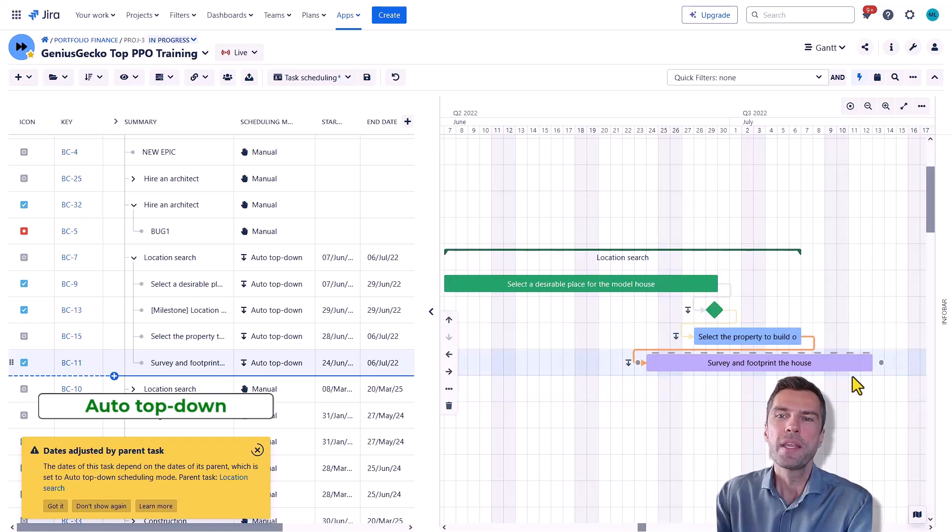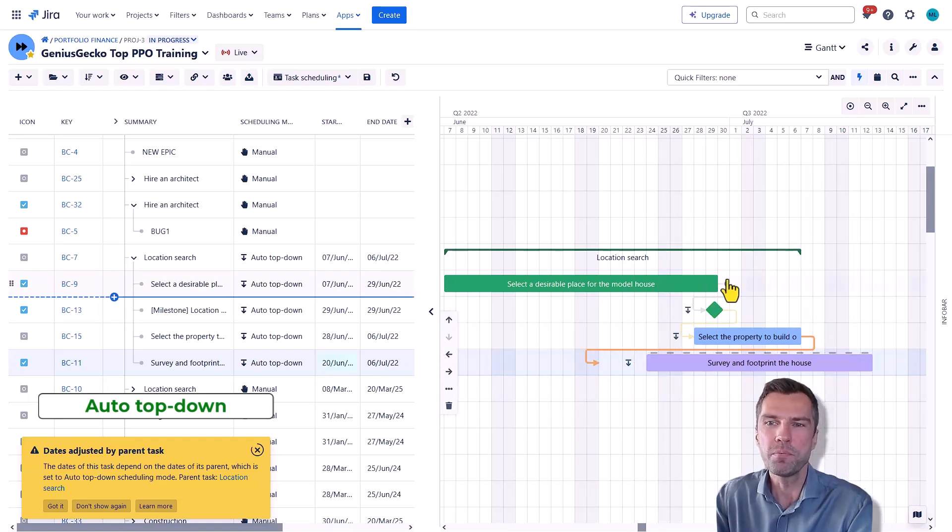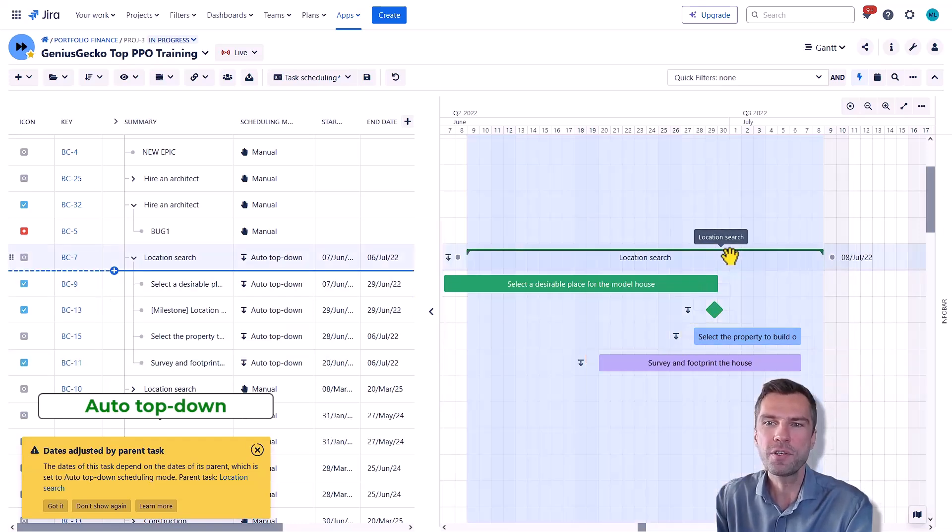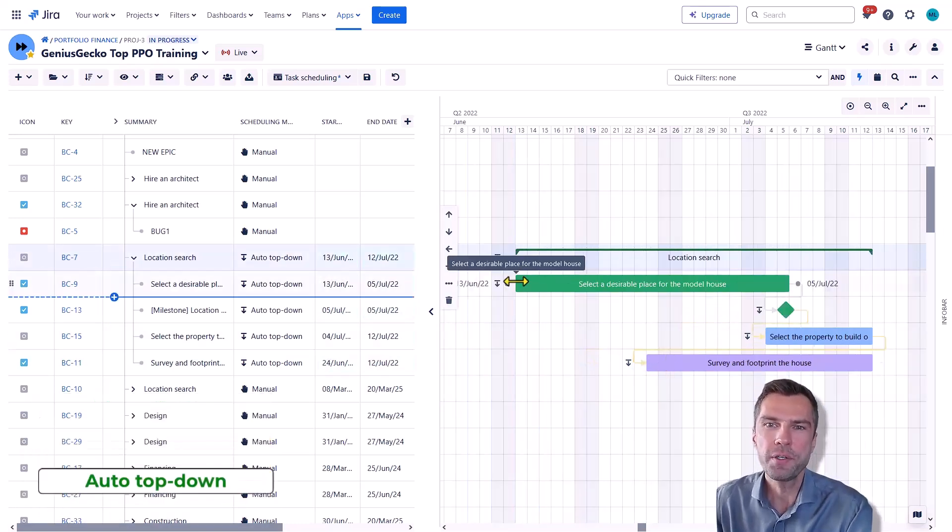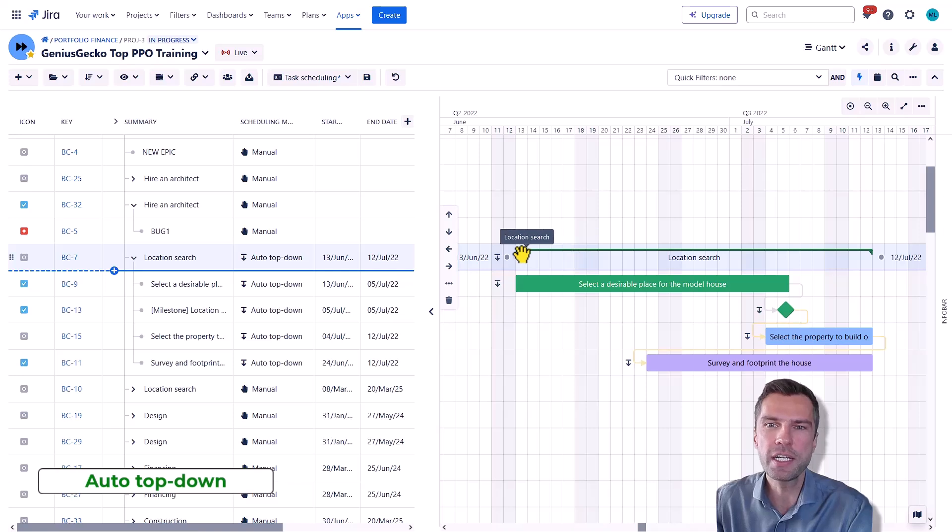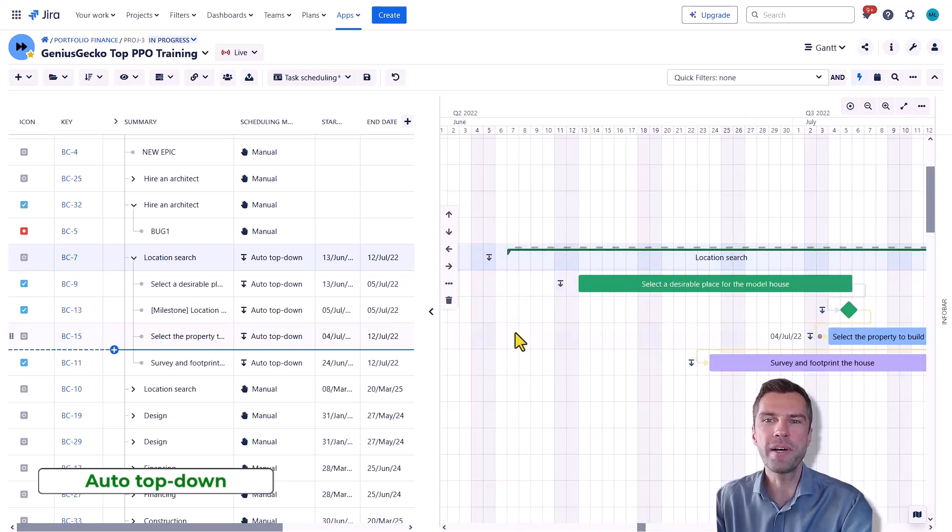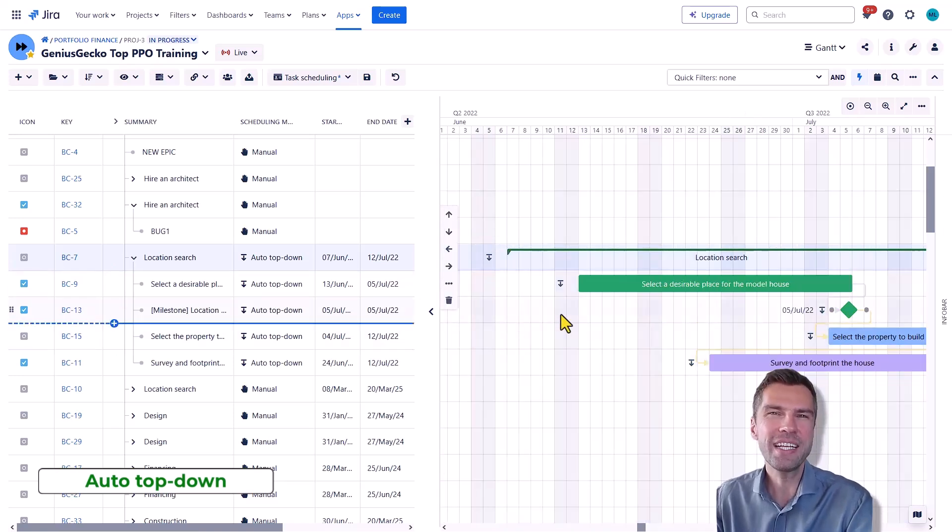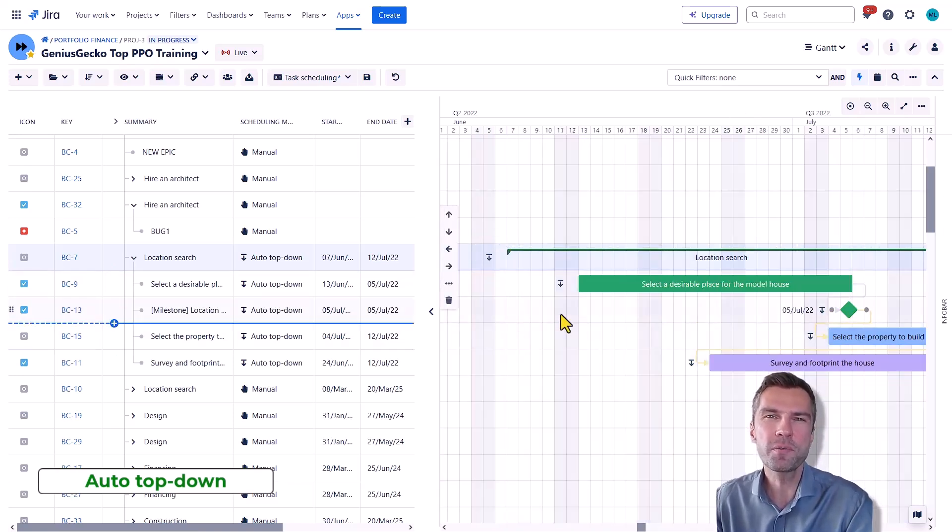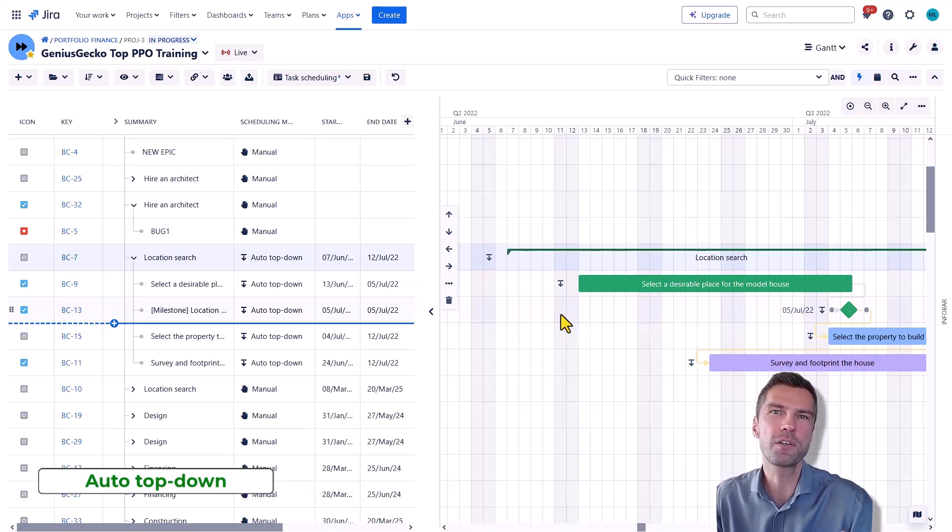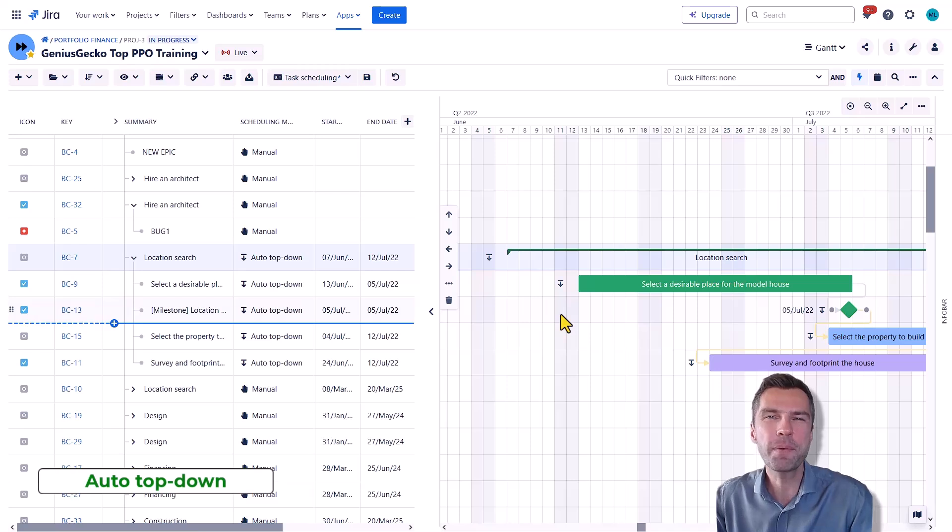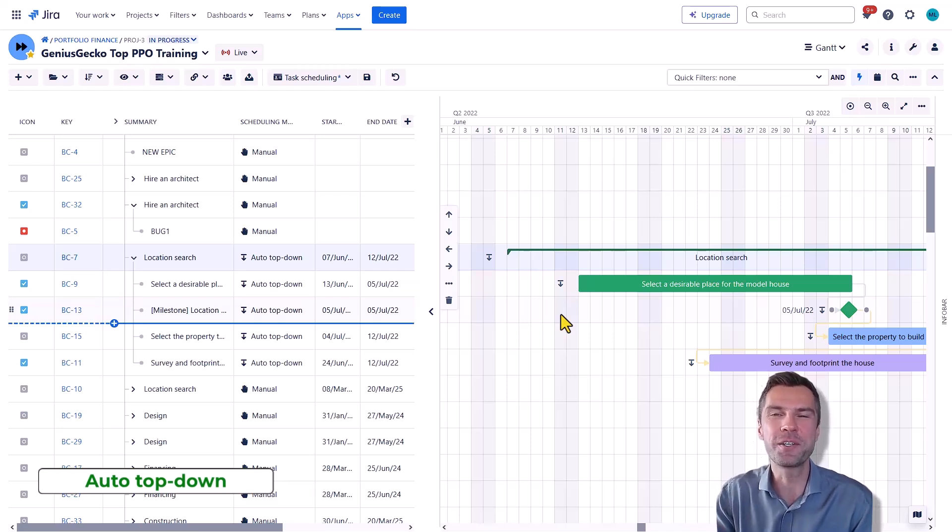Other than that, you can move and drag and drop the whole branch here. You can change the start and end dates of the parent and that's about it. So use this mode when you have a fixed timeline for your milestone stages or for the whole project and need your subtasks or tasks to align accordingly.